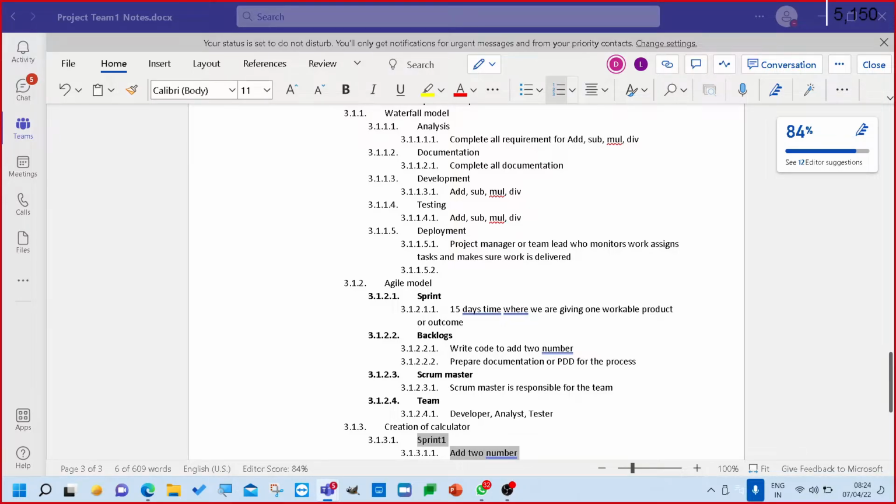Either reduce the timeline, like move subtraction to the next sprint, or have these details after completion of all the items, because sprint time is fixed. That's what I am telling. If there is any addition, it completely depends upon the team to agree on what we need to deliver. If it is not deliverable, it goes into the backlog. Okay. Clear.